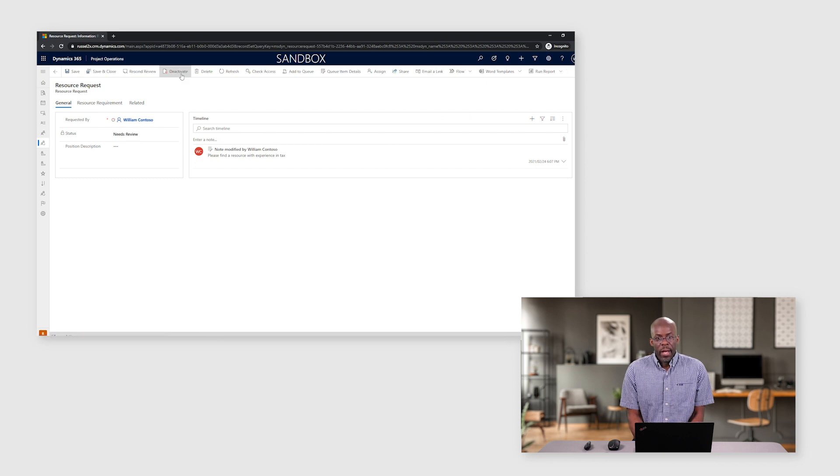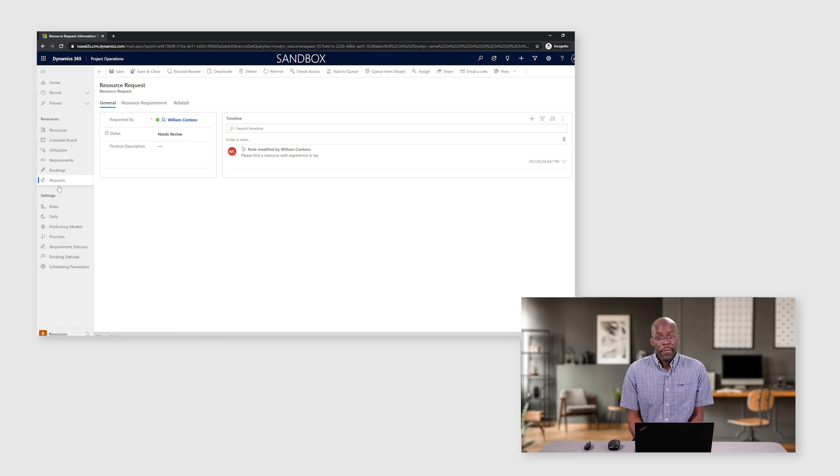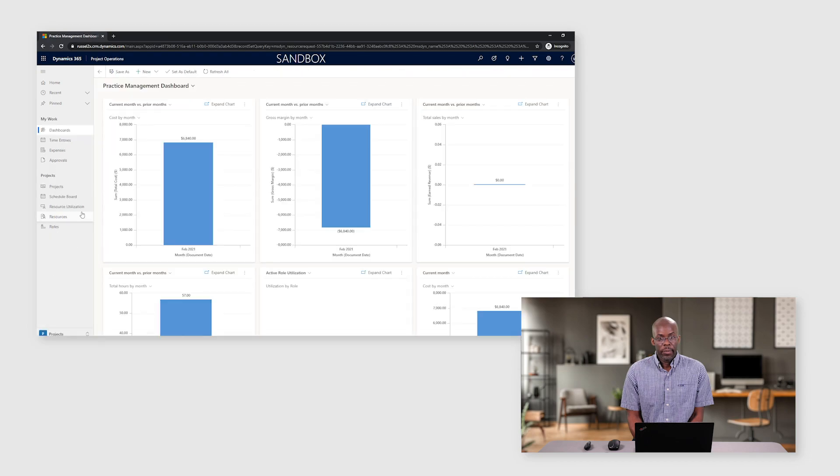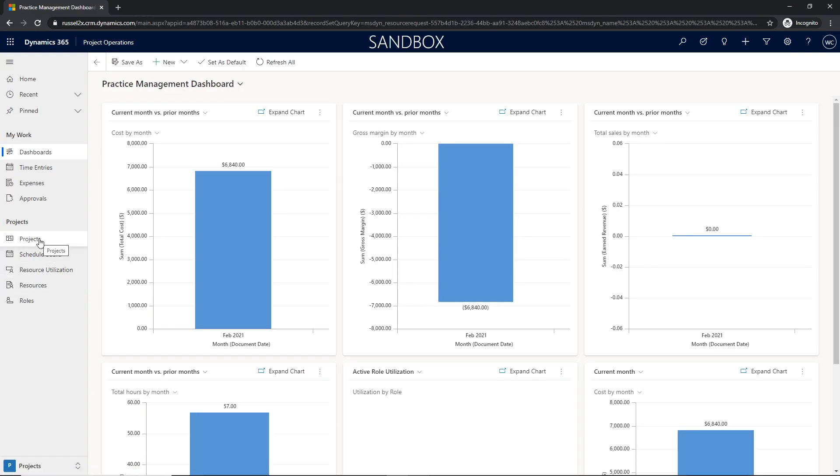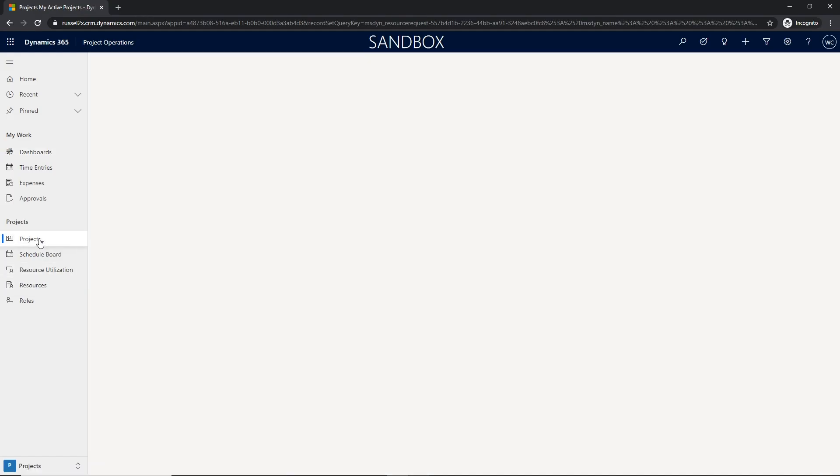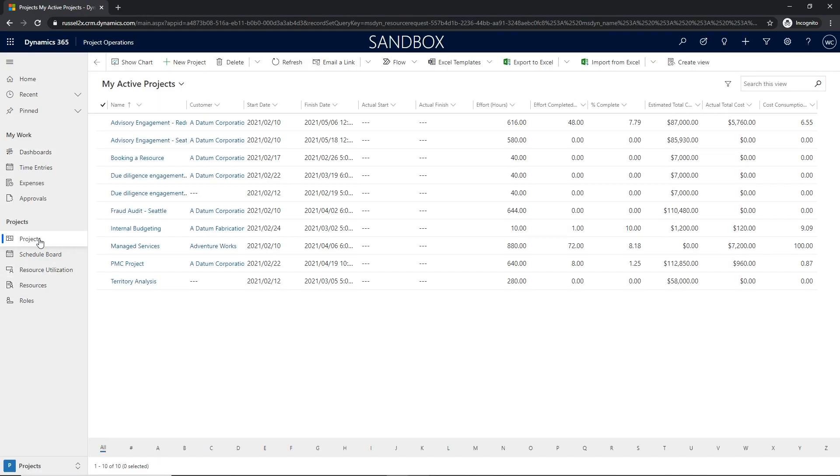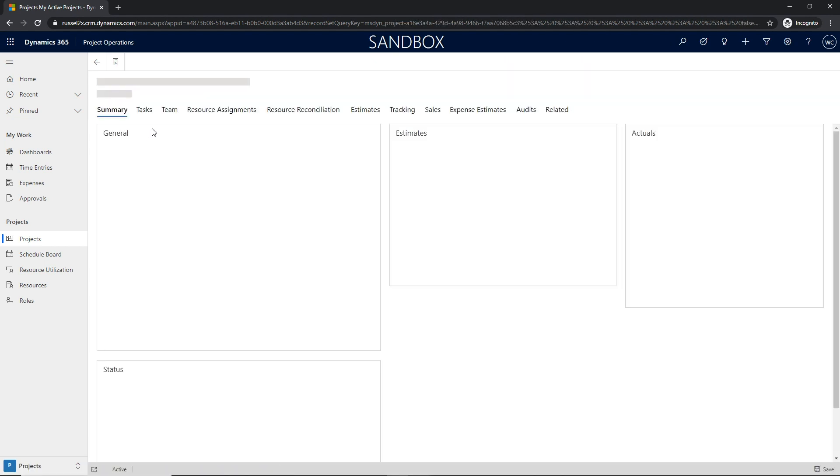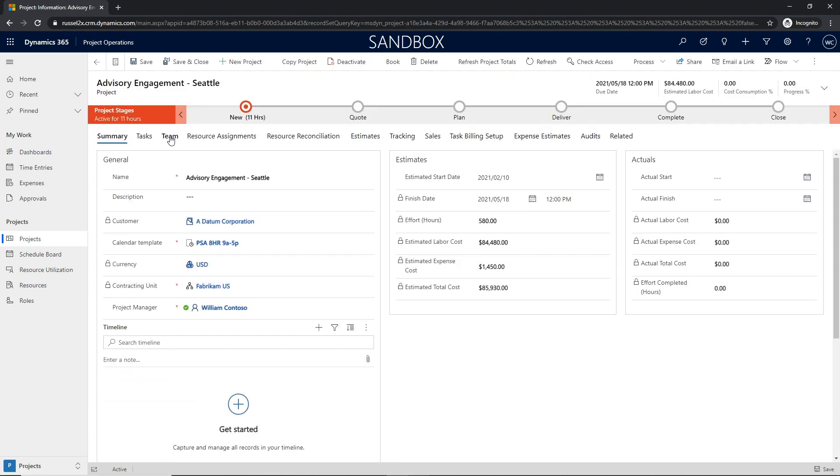The resource manager can leverage a schedule assistant to find a resource based upon the stated requirements related to effort, the role and any other criteria in the resource requirement. Once the correct resource has been identified, the resource manager can submit the proposed resource back to the project manager for review.